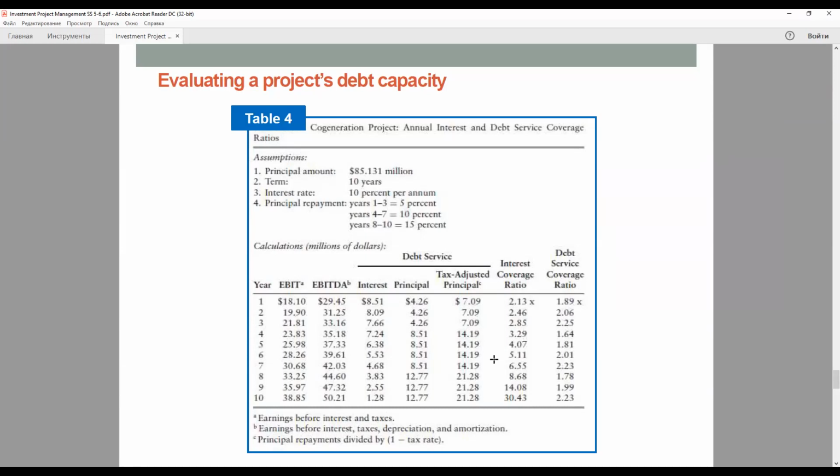Alternatively, the interest rate risk can be hedged. Selling financial futures contracts short during the construction period is one hedging strategy. If interest rates rise during the construction period, and if the hedges have been structured properly, the profit realized on closing out the financial futures positions will offset the impact of the higher interest rates on the project's cost of debt. Later, we will describe various hedging strategies and how to implement them when we talk about the handling of financial risk.